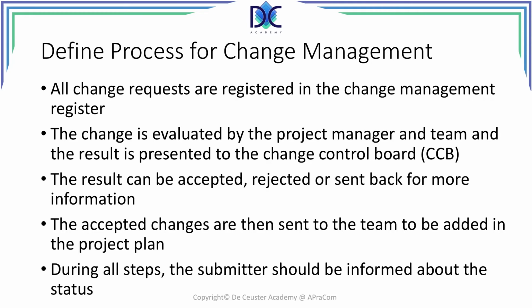What are the steps that we have to follow when we work with changes? First of all, the change requests have to be registered in the change management register. The change is evaluated by the project manager and its team, and the result is presented to the change control board.